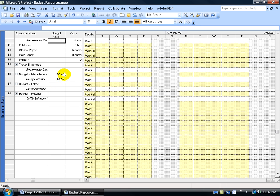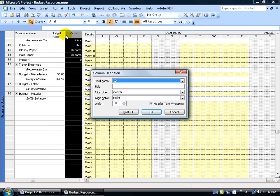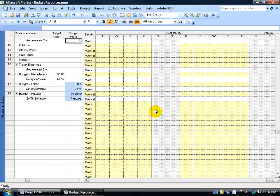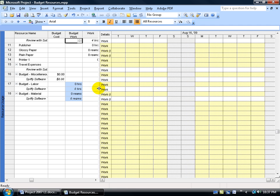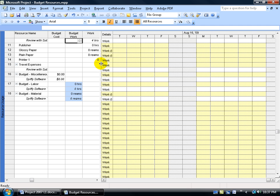Now let's insert the budget work column. Right-click on the work column header, go to Insert Column, type BU for budget, then select Budget Work and click OK. Drag the split bar over and double-click to snap it next to the work column. The zeros for budget work appear for the budget labor resource in hours, and also for the budget material resource in reams. Why reams? Because in the Resource Sheet, the budget material resource has the material label set to reams.